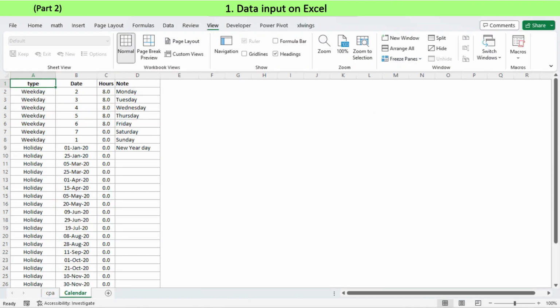Project calendar is in a table with two groups, weekday and holiday. As to the weekday group, 7 weekdays are offered with hours to work each. A weekday of 0 hours is considered a non-work day. Date data of every project holiday within the expected project overall schedule are entered.